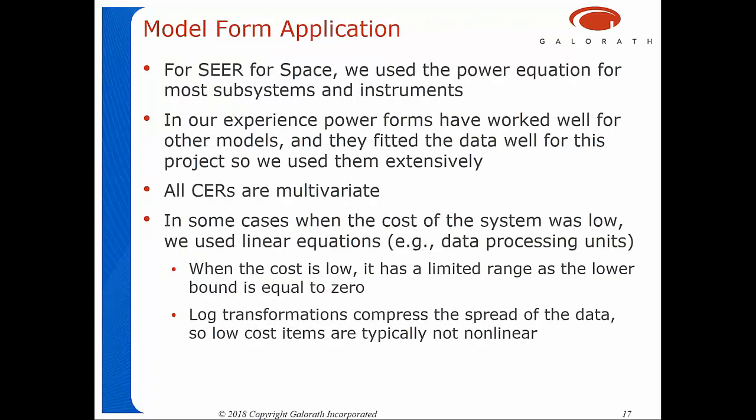Okay, and then, like I said, we use the power equation for most of the subsystems and the instruments. That's worked very well for us. We basically started with that form, and this has worked well for us in practice in the past. We have multiple variables for all the CERs. Typically, it's a nonlinear form, but in a few cases where the system cost is low, such as data processing units, where those are only a few million dollars, the range in variation is not high enough to warrant a log transform, so we use a linear equation.